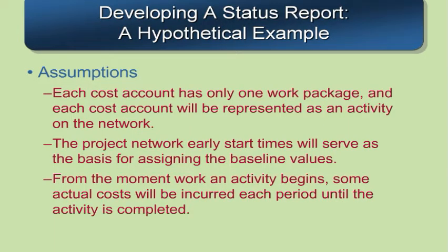Let's take a look at a hypothetical example of the status report development. And before we do that, let's make sure we're clear on what we'll assume while we do this. We're going to assume that each cost account has only one work package, and that each cost account will be represented as an activity in the network.